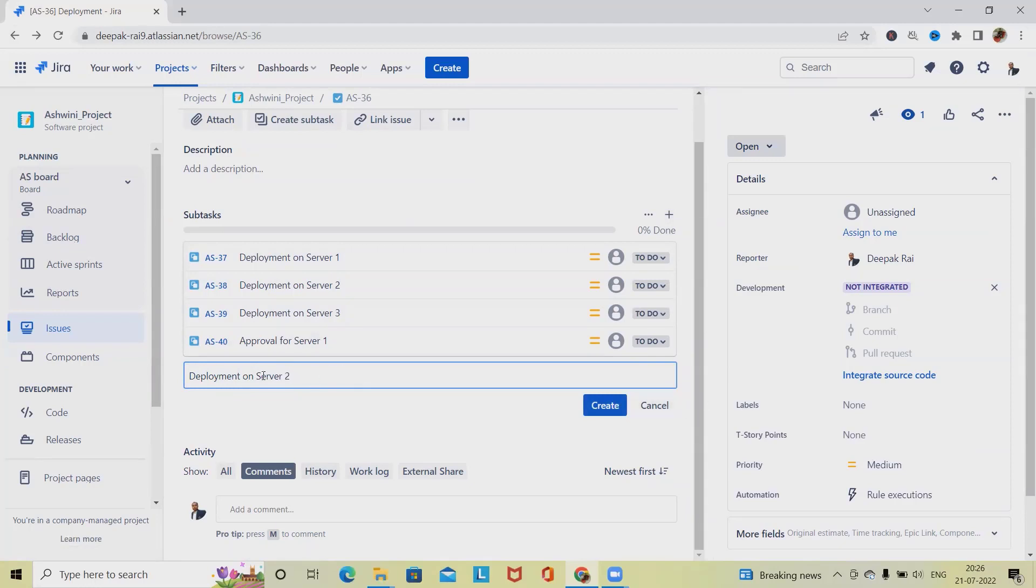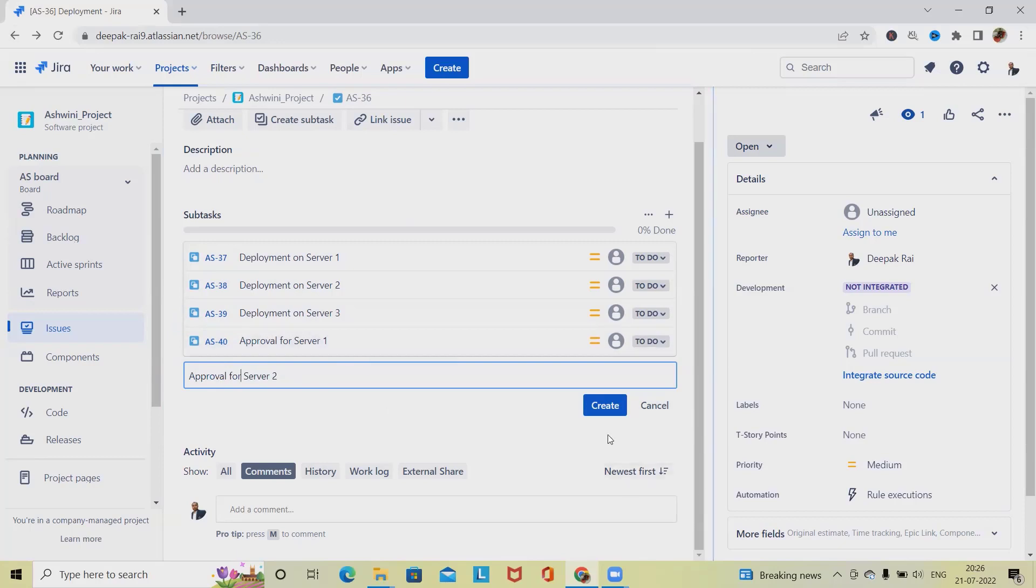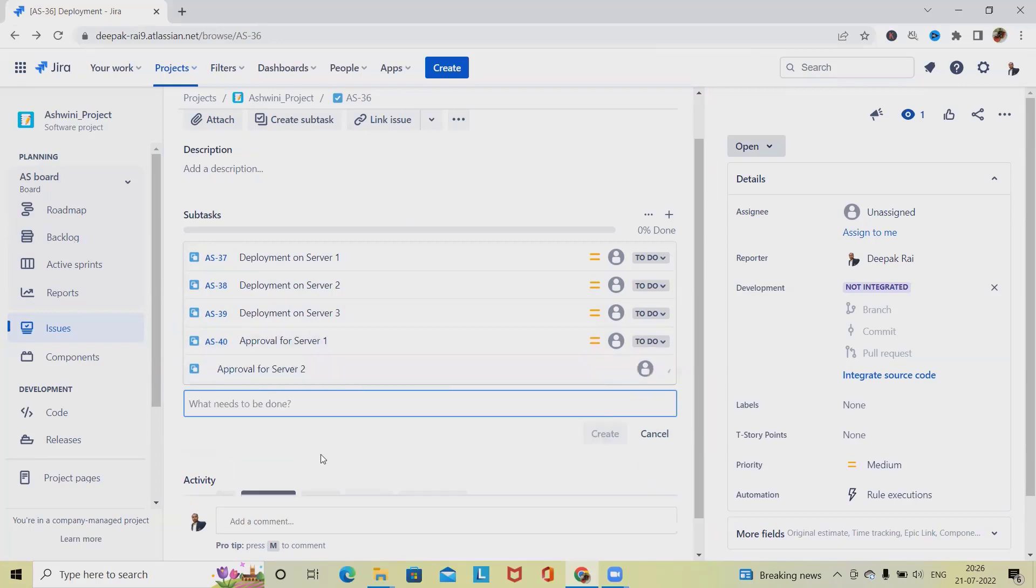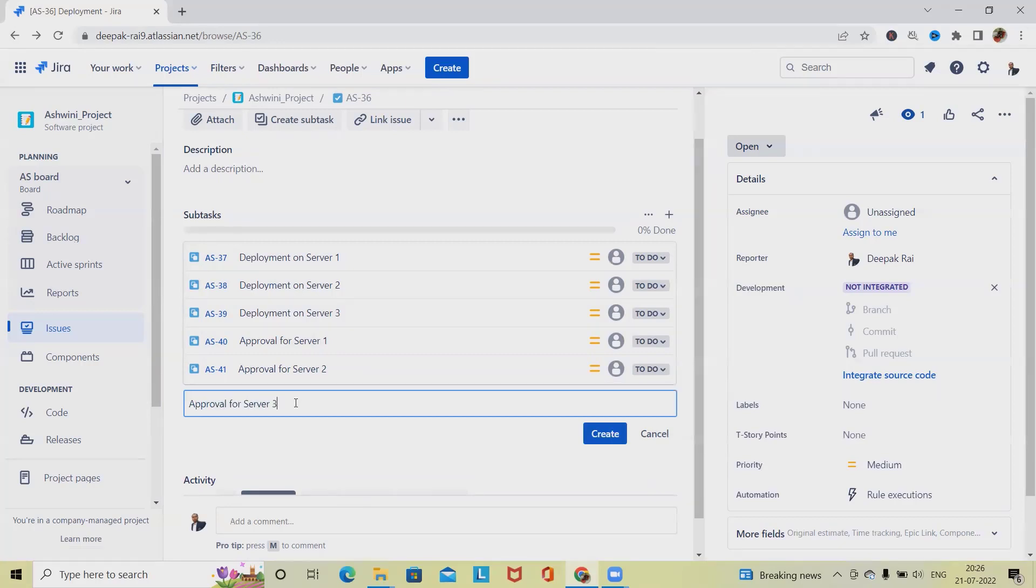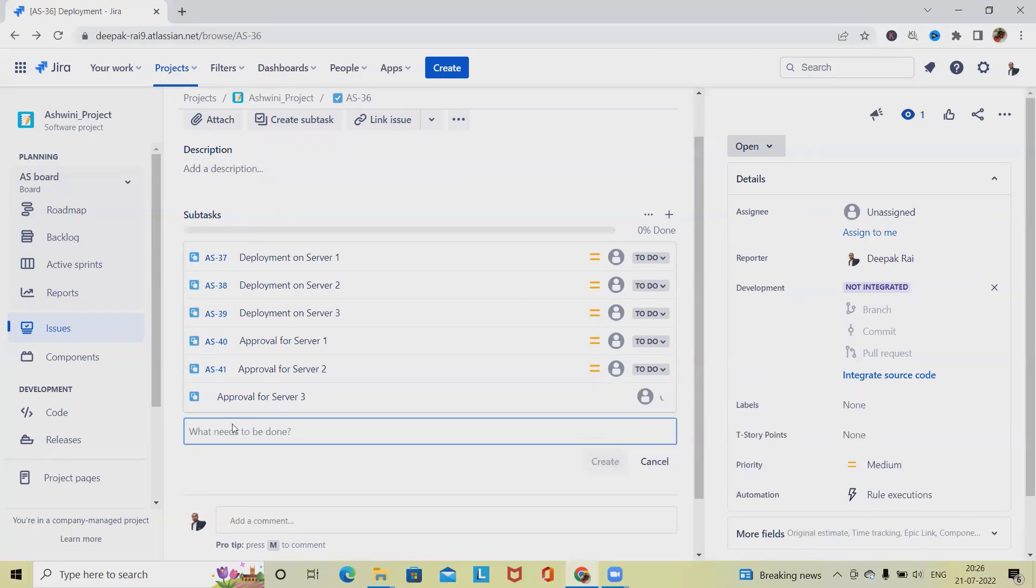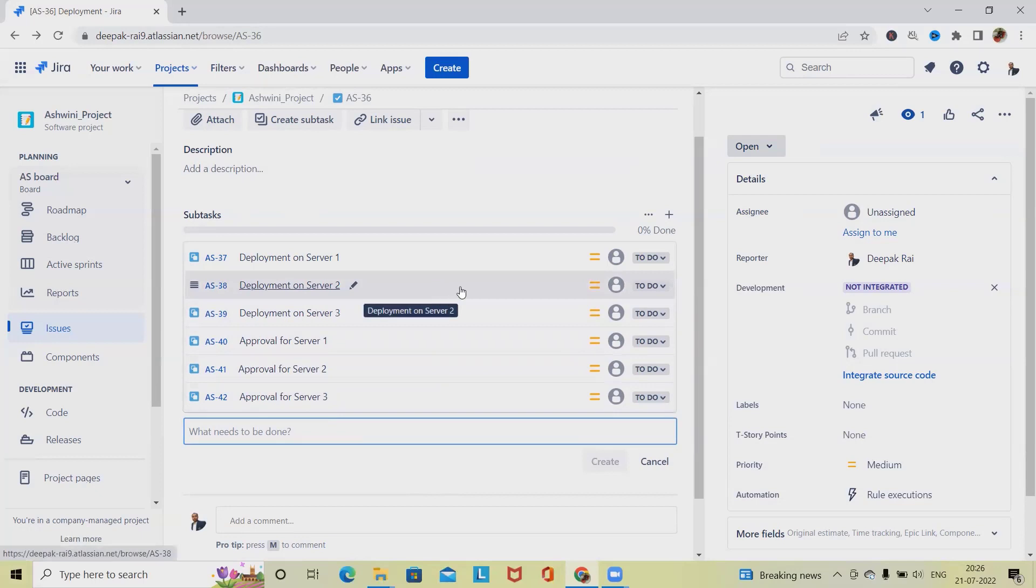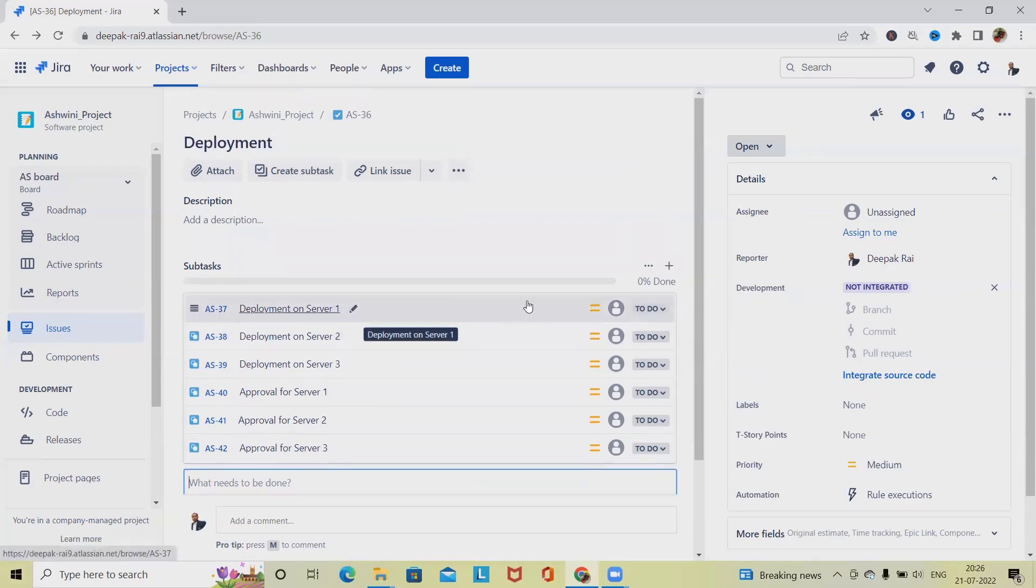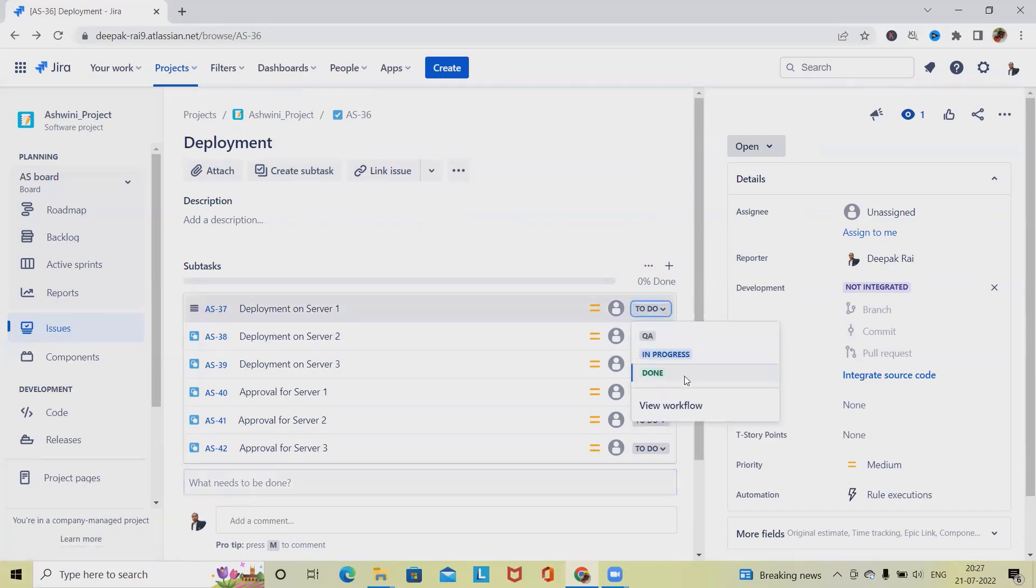Approval for server two, click on Create, then approval for server three. These activities we need to include—these are the actions for dividing a bigger piece of work into small individual activities. Once we update the work structure, you will be able to see the percentage or progress percentage.